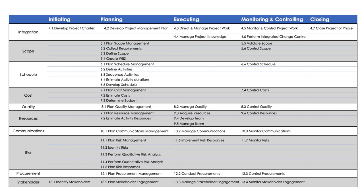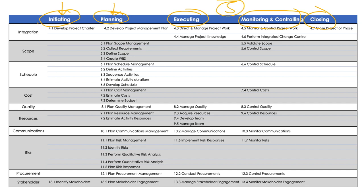What we see on the screen are process groups — five in total. These are called initiating, planning, executing, monitoring and controlling, and closing. We also see knowledge areas, which are 10 in total. And then there are processes — these are the ways I can do a particular work to attain a different outcome. Each process belongs to a knowledge area and a process group. In total, there are 49 processes.